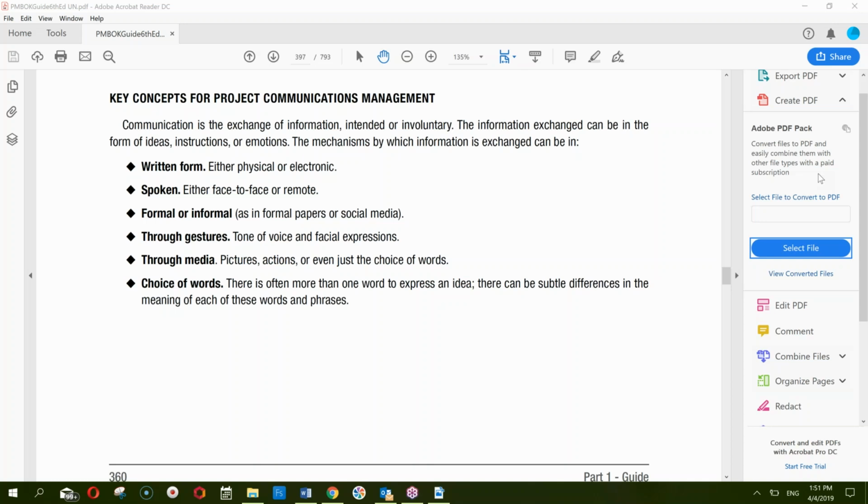There will be restrictions put on certain channels, that this communication cannot happen, or there could be conditions imposed on certain channels, that this channel will only be used in case of emergency or something like that. So you define it, and that would refine which communication channels will have to be opened for what purpose.